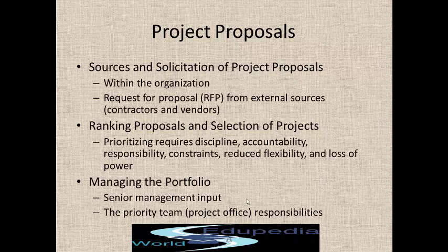And then they will explain the project: what they are going to do, the methodology they are going to adopt to execute the project, the various financial models they are using, the cost, and the estimation methods they used to arrive at the cost, the timelines and the budget, the metrics they are going to give, the service level agreements, the services they will offer as part of the project, and the type of contract they are going to execute, whether fixed price, time and material, or another type. All those things are outlined in a request for proposal.